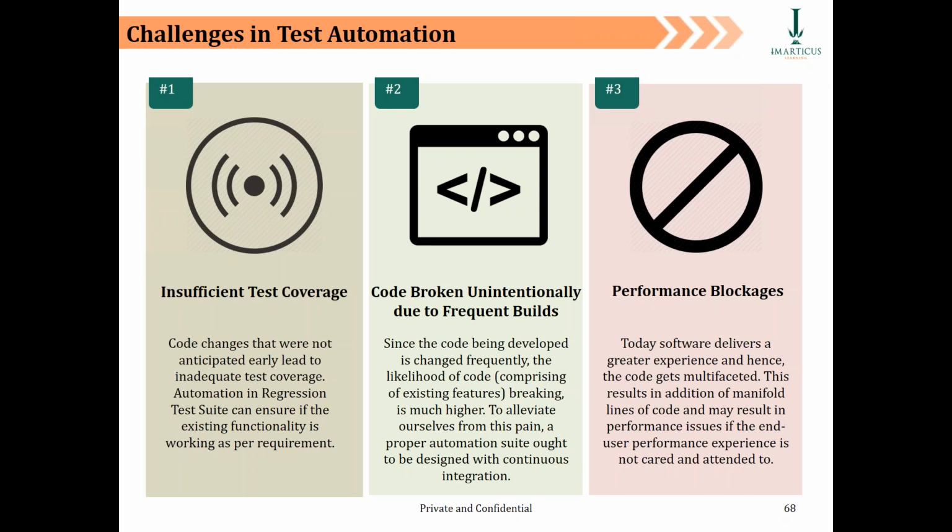This means you had 50 automated scripts, great. But then when you kept updating codes for various business processes, or you kept changing configurations and multiple other things, you need to create the testing coverage into it as well. So you may say, hey, I got an automation testing going on, fine. But then what's the use if you have 30 business scenarios to test, and honestly, your scripts are good enough to test only 15 of them. So as the business scenarios change, you have to ensure that the test coverage is also done, which means the automated test scripts are also written alongside.